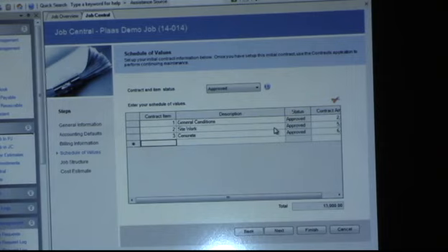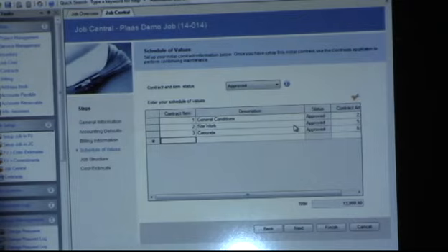If you're doing work in five different areas and they want you to invoice them against those five different areas, then you would set up those five as the line items. But even T&M, you can divide between labor, material, equipment. So if it's tracking your costs, you would set up your estimate to track labor. Here's how much I'm going to do on labor. Here's how much I'm going to do on material. When it's invoicing your customer, if they want an invoice that has a line item for material and a line item for equipment, you can have two line items there.